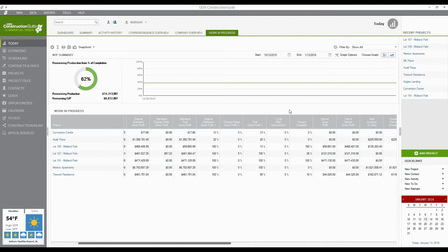So it's going to give you a percent margin, if you will, as a comparison between your job costs on the estimate from the initial proposal to what you actually spent on the job, and show you if you were over budget, under budget, and how far away. And really the reason I bring attention to that is because most of you guys think, well, of course, being under budget is always a great thing. And it is in most cases. Obviously, being over budget's not somewhere you want to be. But if you're under budget too often or too much, it can be a bad thing.